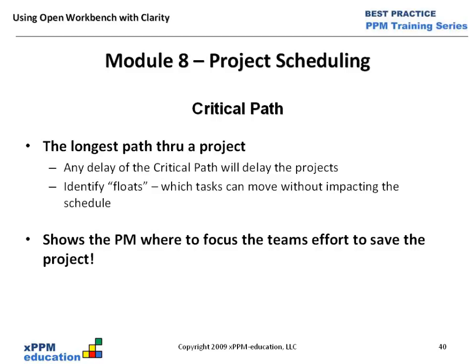So when we talk about things in the industry about crashing the schedule, that's what they do. They go look at the critical path and they look for ways to reduce individual task durations so that one task duration reduction equals a project duration reduction.